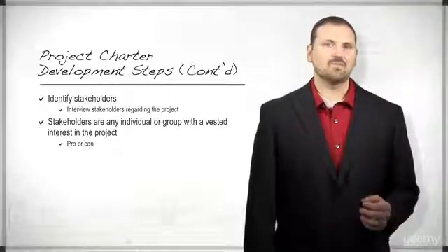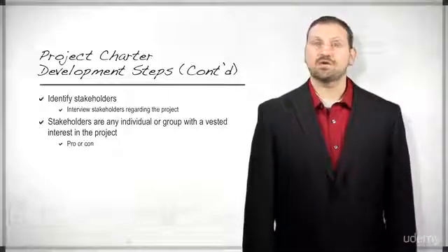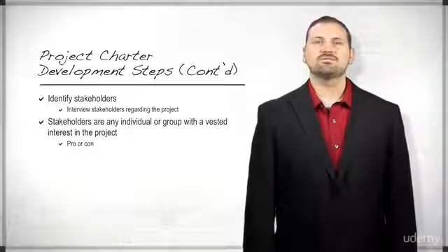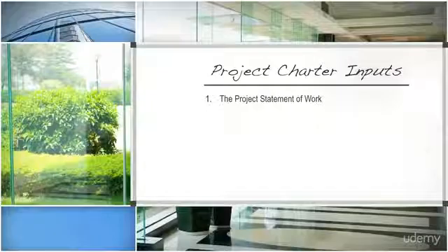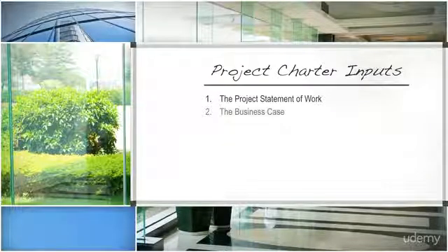In support of developing the project charter, the sponsor and project manager will incorporate 5 key inputs: the project statement of work, which helps answer the who, what, when, where, and why type questions; the business case, which is a brief description that illustrates the need and benefits of the project. The business case is often supported by financial analysis, such as net present value and break-even analysis.